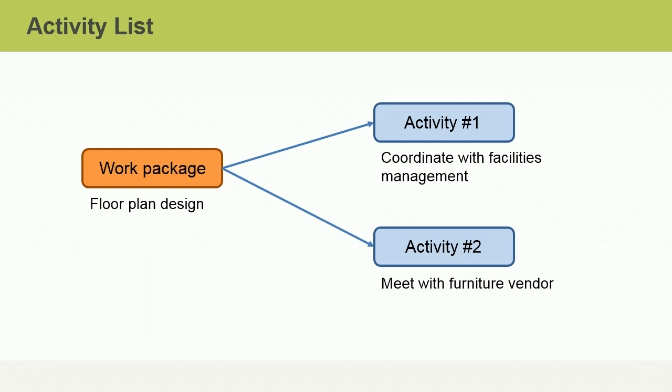Defining activities is one of the first processes in developing the schedule. The work breakdown structure, or WBS, is used here. The WBS was created when planning scope. Taking the work packages from the WBS, we further decompose this work into activities.